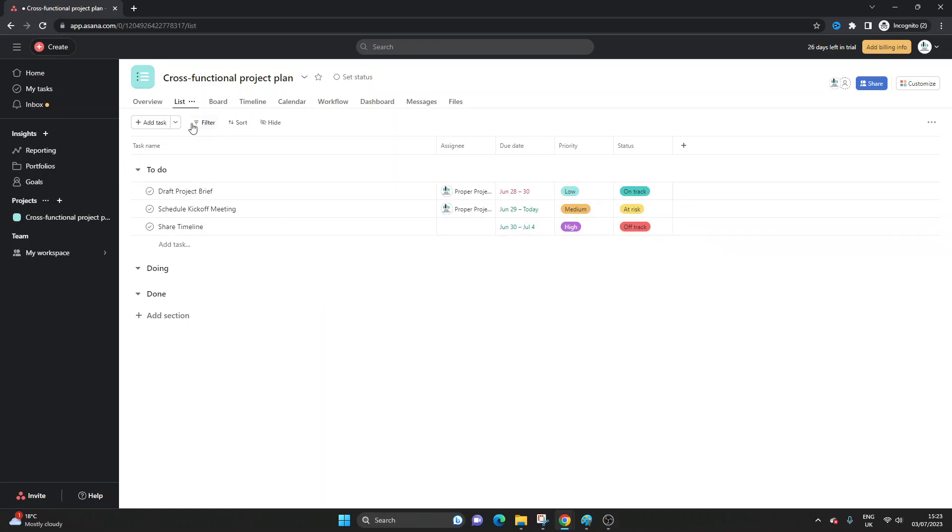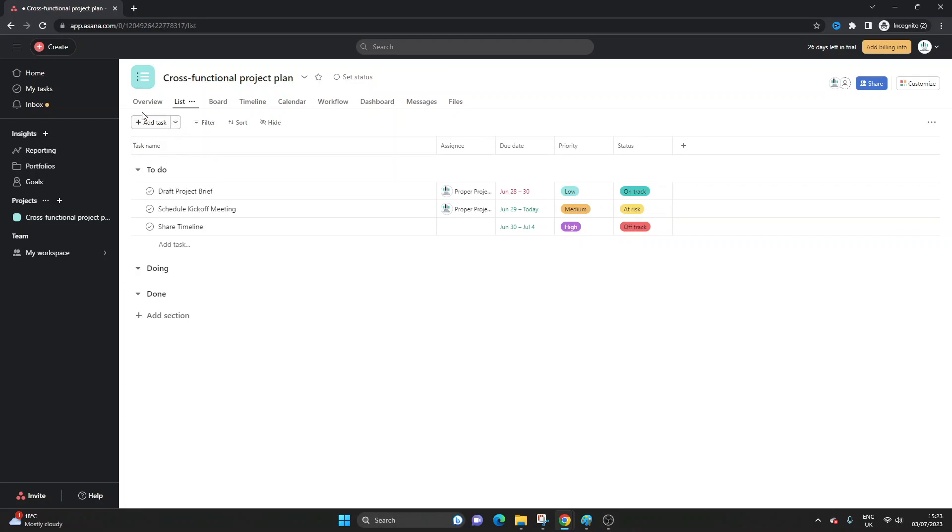So in Asana you can set up milestones via, well there's two ways to do it. Firstly you can create a milestone from scratch and to do that you'll notice there's a dropdown here and then there's the ability to add a milestone.